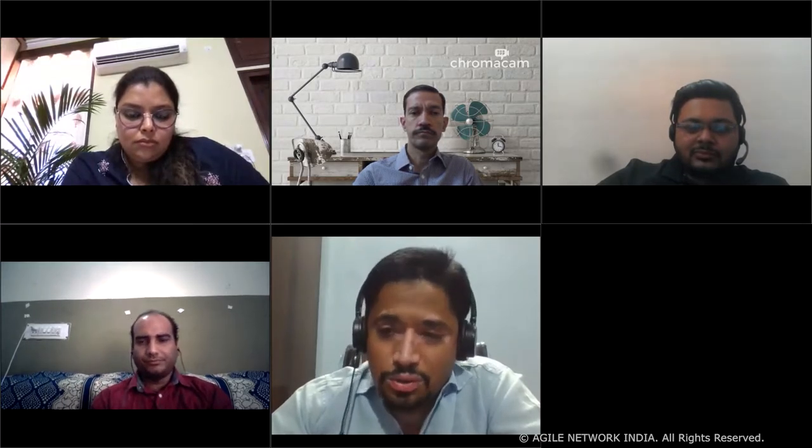So that specific requirement came in, and by understanding the criticality and priority of that requirement, for the module we were implementing as part of that release, we commented out the code we had already implemented, and we pushed that complete module into the next release, and we worked on that specific module because it was quite critical. So basically, you need to balance customer satisfaction by considering the feedback and analyzing it, and obviously sometimes you say no to the client because the impact is so high.